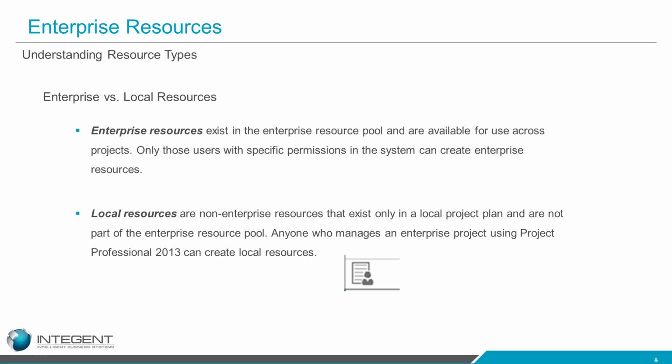you're using. It would also provide the ability for other project managers or resource managers to go to Resource Center, which I'm going to show you in just a little bit, and see how that resource is being utilized across multiple projects. So if it's an enterprise resource and the project has been published, you would be able to see how their availability is being decremented based on all the projects that they're being assigned to directly right in Resource Center. A local resource, however, that visibility will not be in Project Center.